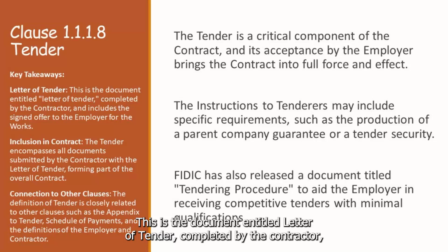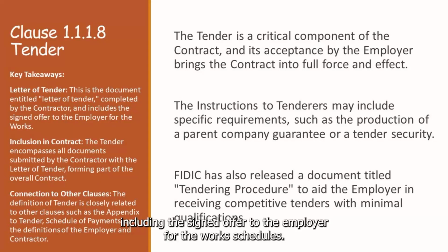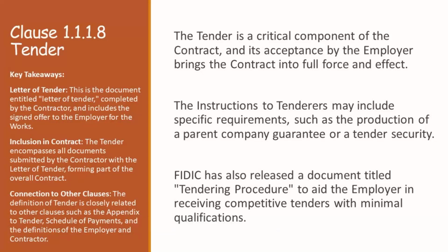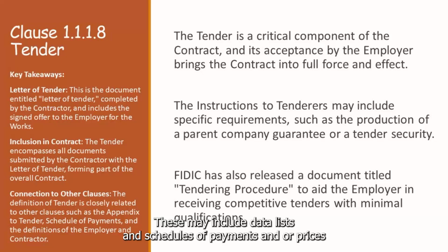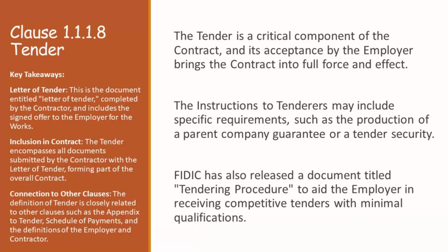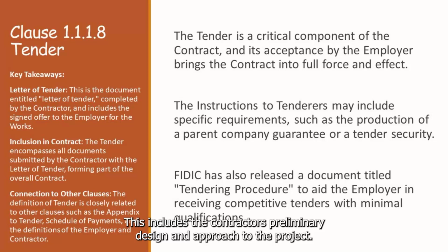This is the document entitled Letter of Tender, completed by the contractor, including the signed offer to the employer for the works. Schedules. These may include data, lists, and schedules of payments and/or prices, completed by the contractor and submitted with the letter of tender. Contractor's proposal. This includes the contractor's preliminary design and approach to the project.